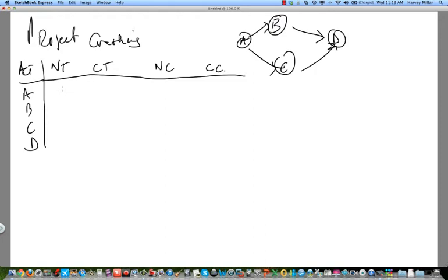All right. So what if A, normal time? Five days. Crash time? Three days. B, 10 days and seven days. 15 days. We could cut that down to 12 days. And D is six days. And we cannot reduce it. All right. So when you look at your normal times, A is five. B is 10. C is 15. And this is six.